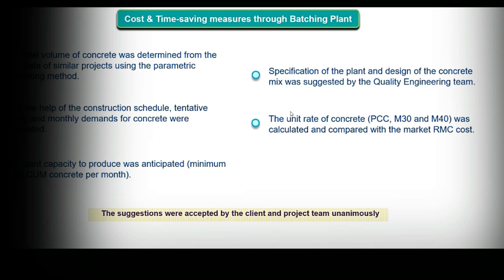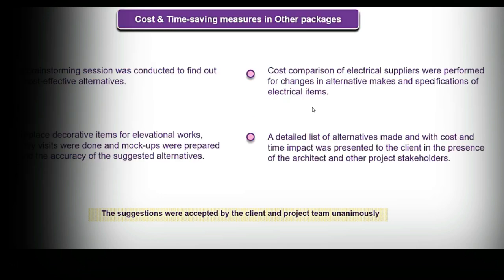And for other packages, a brainstorming session was performed with the relevant team members. We have visited the factories and also prepared the mock-ups to see the accuracy of the alternatives. And a cost comparison was prepared and delivered to the client. And finally, they have accepted the suggestions.